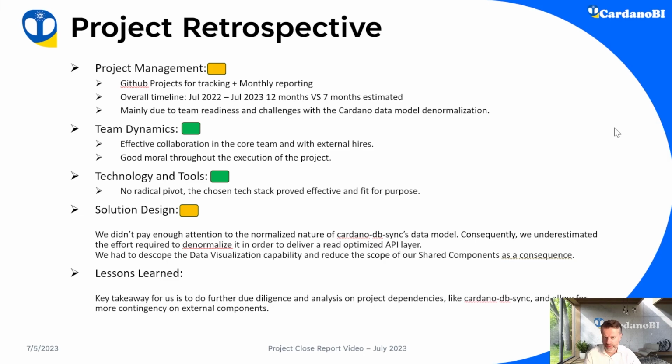No radical pivots were required. The chosen tech stack proved effective and fit for purpose. Solution design, Amber. We didn't pay enough attention to the normalized nature of CardanoDB Sync's data model. Consequently, we underestimated the effort required to denormalize it in order to deliver a read-optimized API layer.